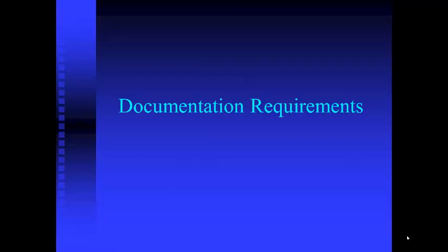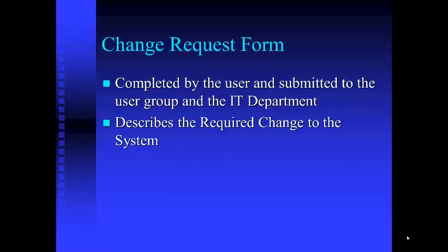Configuration management also has documentation requirements. If you have a controlled system, you have to have documentation so you know what changed and what's included in each release. One of these is the change request form, completed by the user and submitted to the user group and IT department. It should include the name of the user, date of request, priority of change on a 1-to-5 scale, approximate savings and cost benefit to the company, system area, and a detailed description of the change.